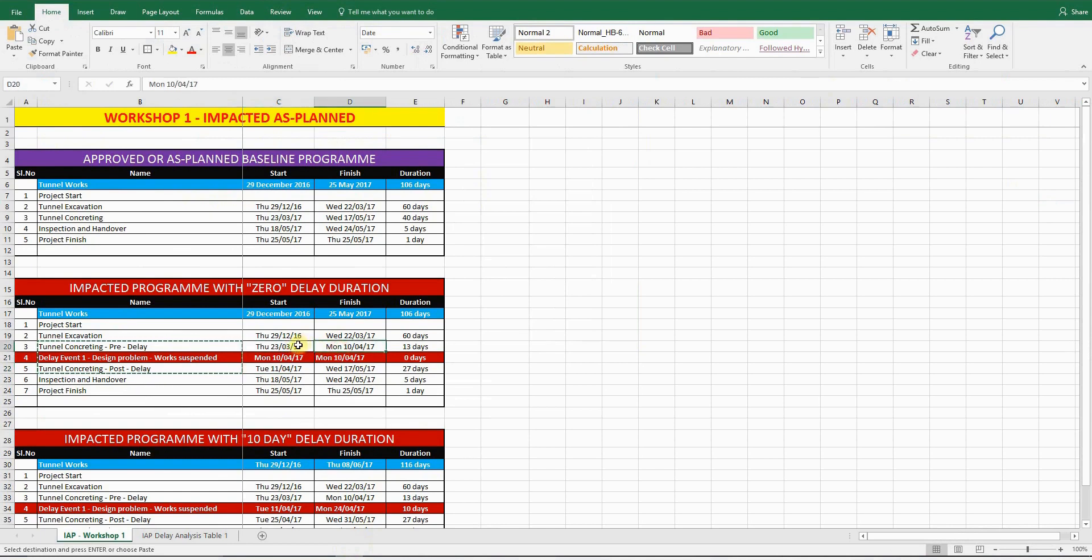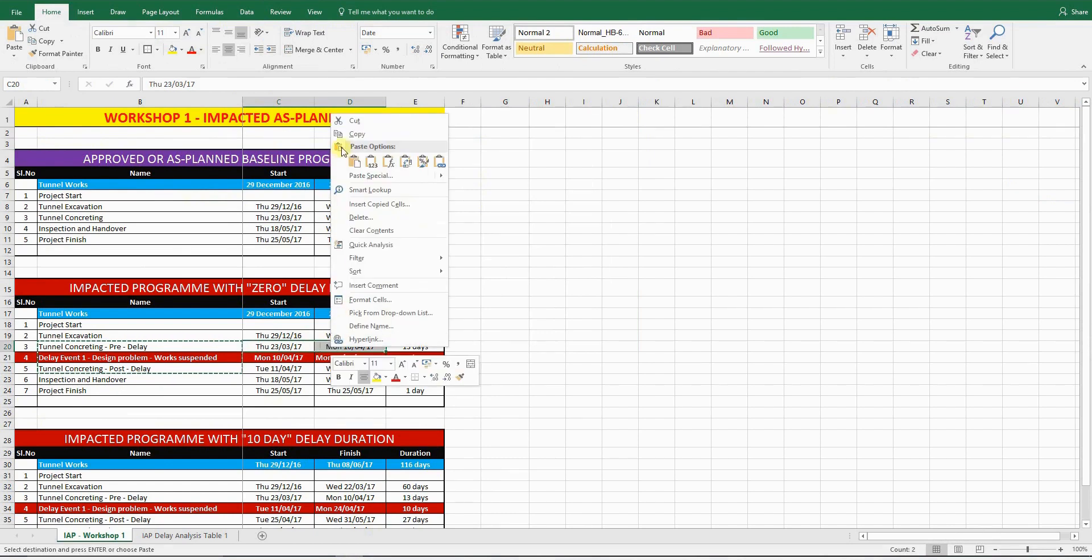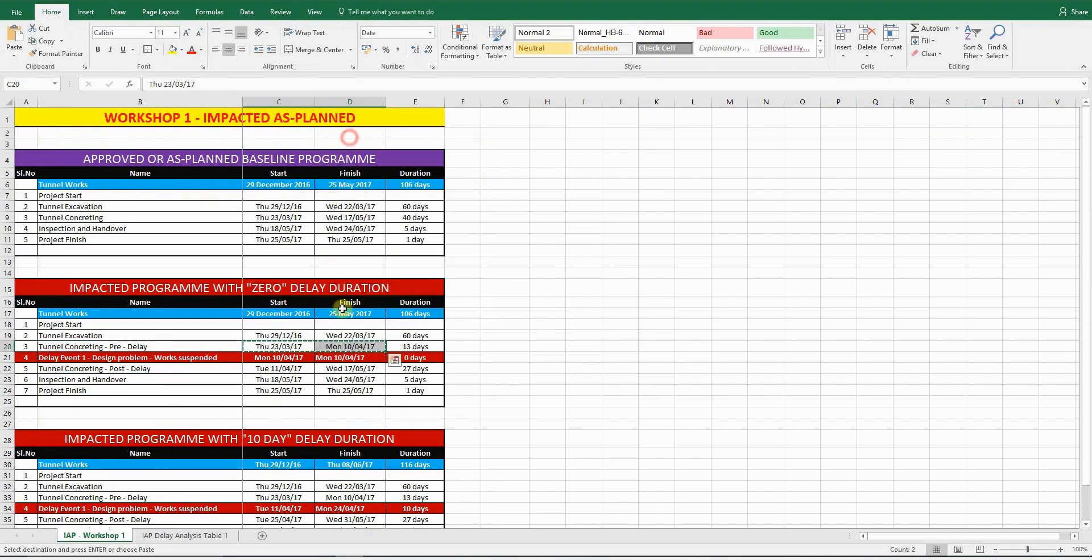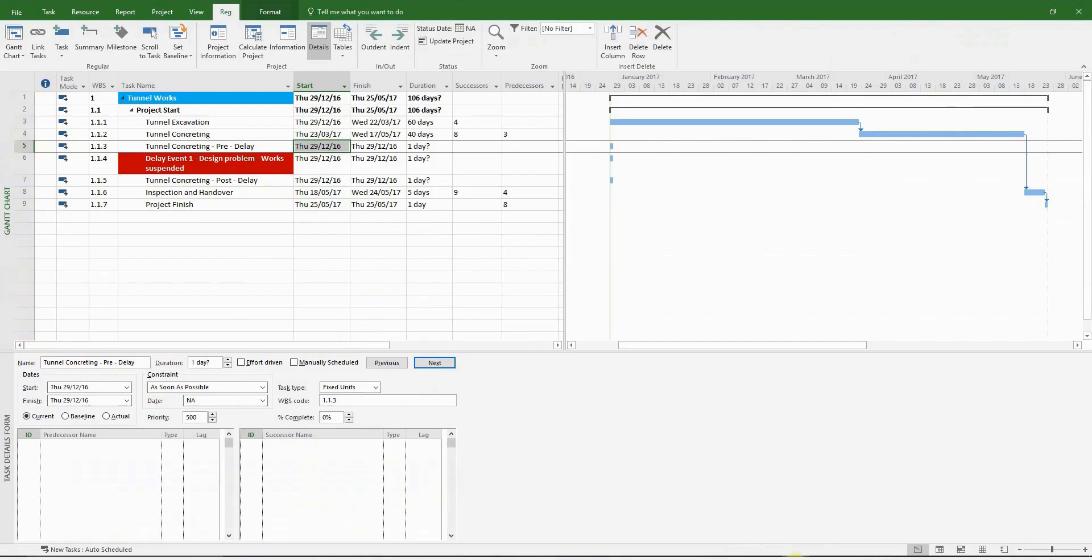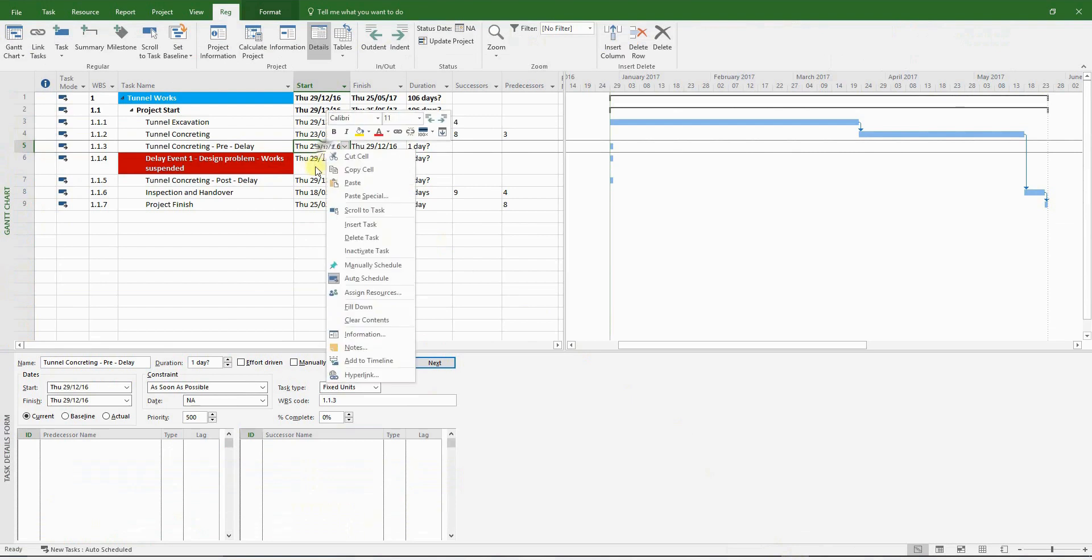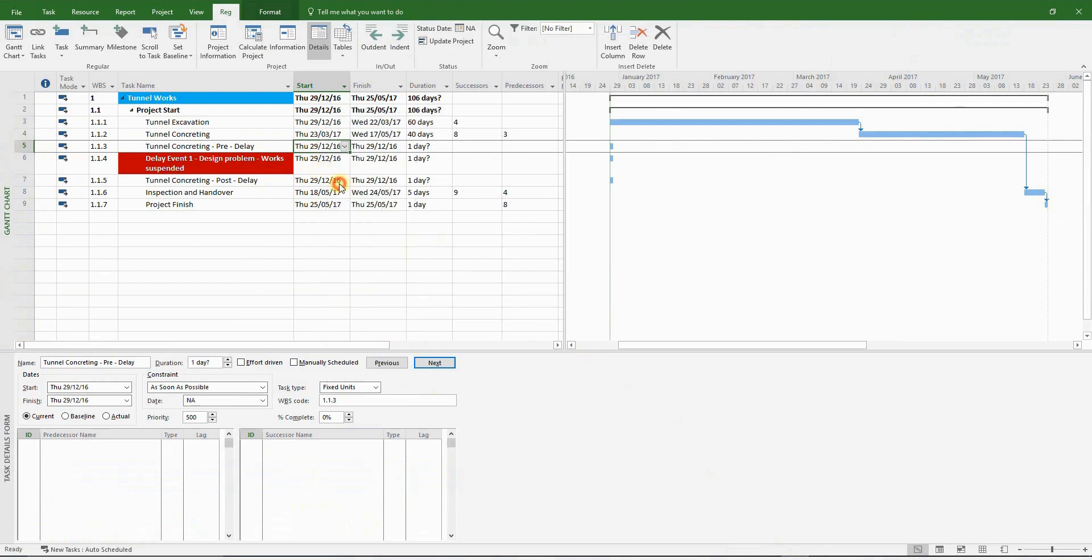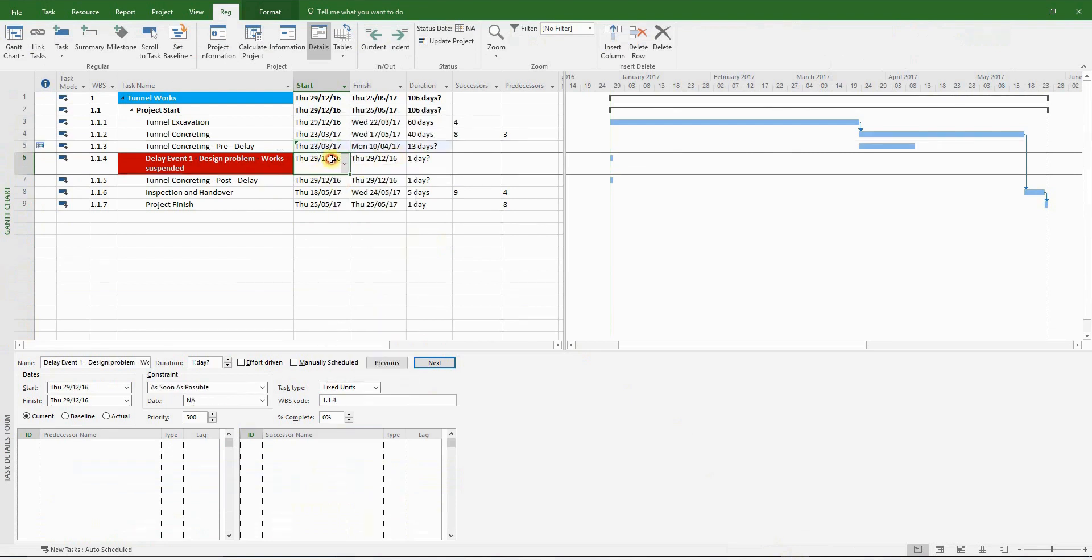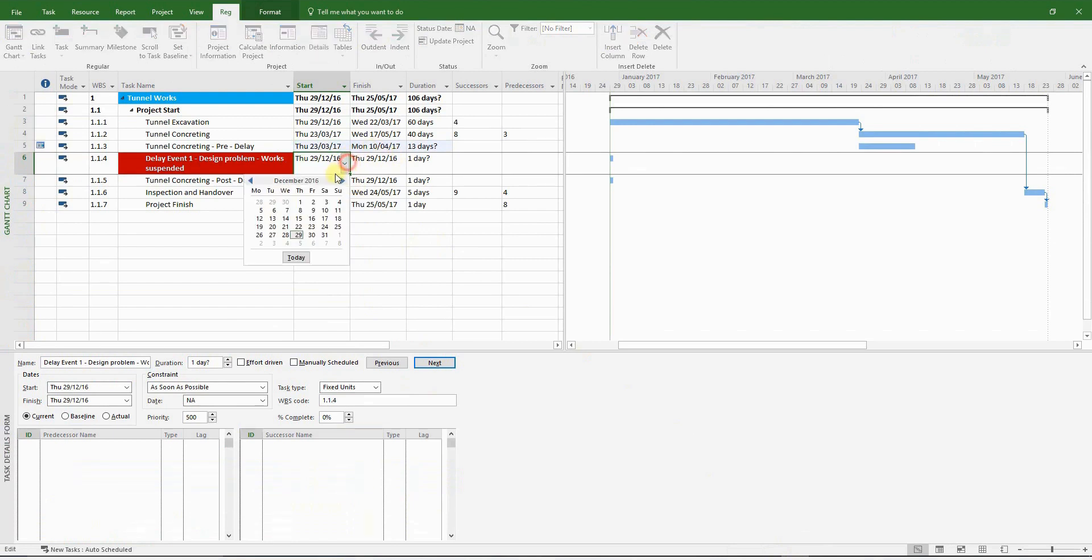After I've inserted all the relevant durations, I will delete the original tunnel concreting activity. So I'm just updating the start dates based on the information given in the Excel file.